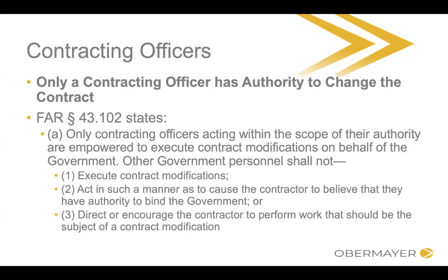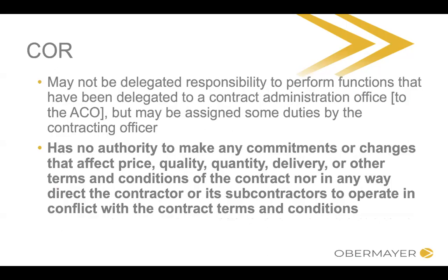So nothing they said should have told you, oh, yeah, I should assume that this is a change to the contract and I'm going to go ahead with whatever they just changed. They don't have the authority to do it. Only the contracting officer has the authority to do it.